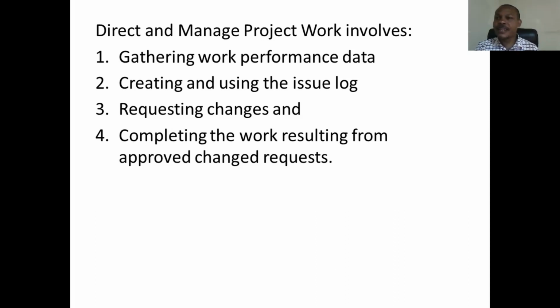So if at the end, the change control board decides to approve your change request because of reasons that are very beneficial to the project, then the project manager will have to take it back to the person that requested the change and inform the person officially that the change has been approved. And then he will document the change, and after documenting it, he will make sure that the change has been implemented in the project.